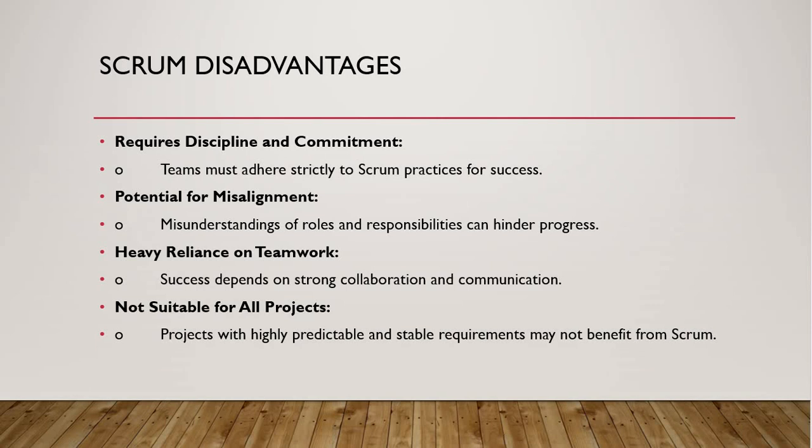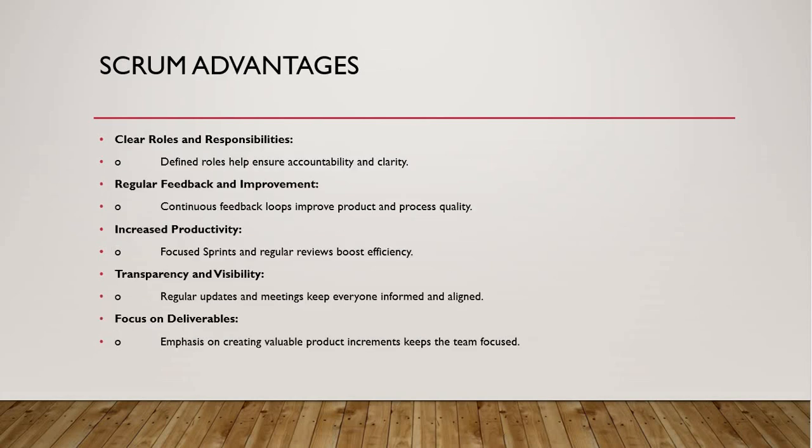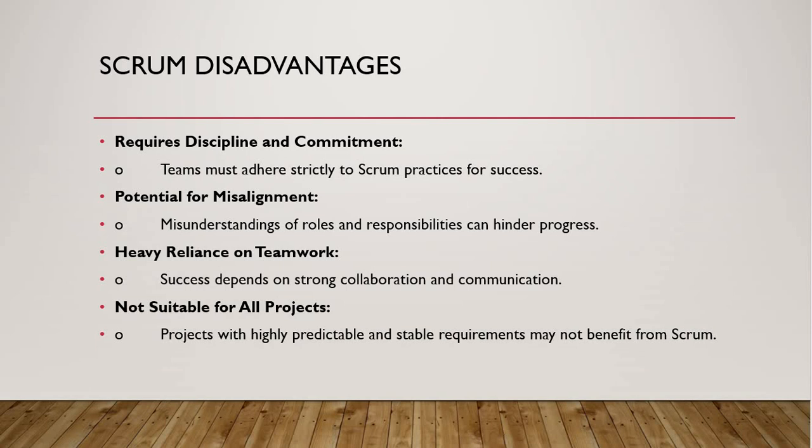And also, Scrum is not suitable for all projects. Some projects with highly predictable and stable requirements may not benefit from Scrum, because in Scrum we are open to customer or stakeholder feedback, so the scope can grow bigger. So it is not suitable for projects with a tight budget and tight timeline.